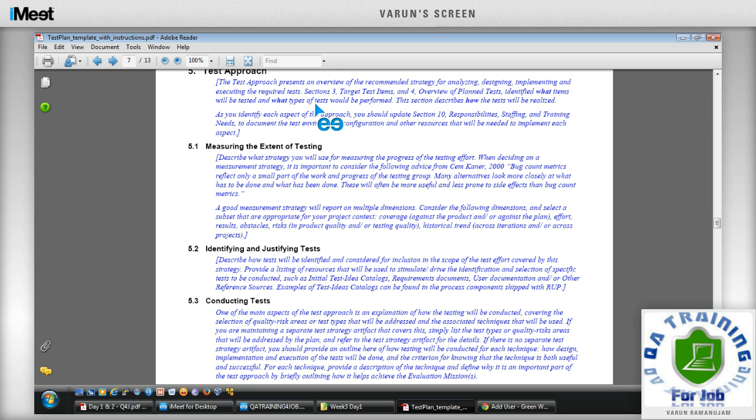In some small projects, like 1 week or 2 week projects, you write a test approach document. You don't write a big test plan. You don't need all this information. You need only what am I testing, how am I testing, when it will be completed, basic information, and what my test inclusions and test exclusions are. Inclusions are also called in scope, test in scope.